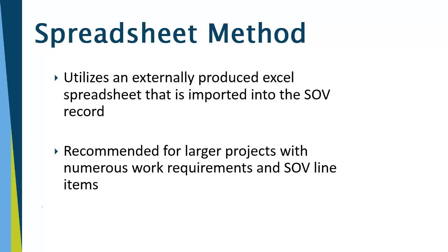For the contractor schedule of values, we're going to use the Spreadsheet method. This utilizes an externally produced Excel spreadsheet that is imported into the SOV record. This is recommended for larger projects with numerous work requirements and SOV line items.